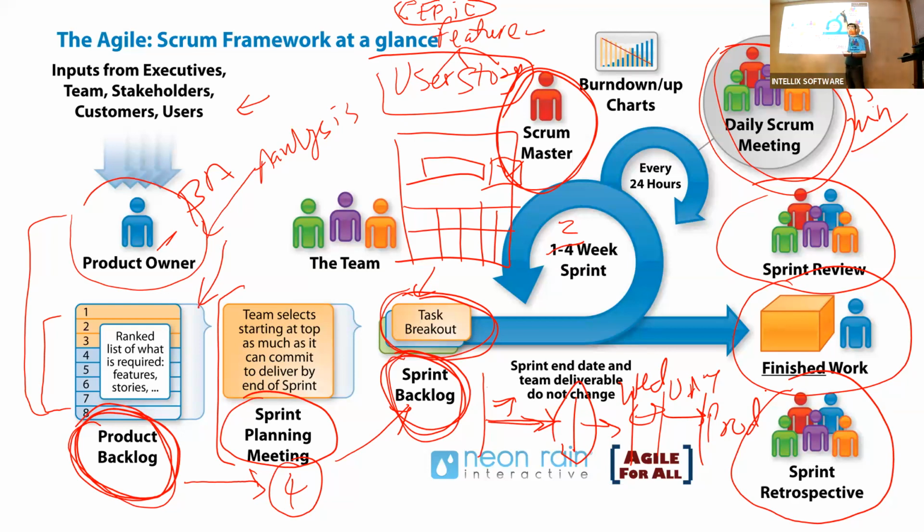It might go up and down. If I estimated 10 hours but now completed it in 4 or 5 hours, the chart will show it going down. It's based on the estimate. Ultimately, everything has to be zeroed out by Friday, because if everybody is delivering the work, then everything should go smoothly.